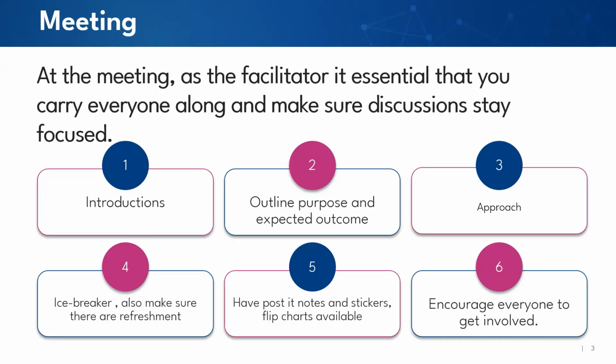So that's what you do in the meeting, and you keep on talking about it. First of all, you've allowed them some time to think about what they want to write down. You've given them sticky notes. They've written down all their notes. Then they've all stood up by themselves to put the sticky notes in the right section, right? Then you go around and look at the sections with everybody's sticky notes, and you jointly agree with all the stakeholders in the room what goes into what group. You ask, what were you thinking about when you wrote this, to make sure that we are categorizing it properly, and that helps you categorize all the risks or all the lessons learned.